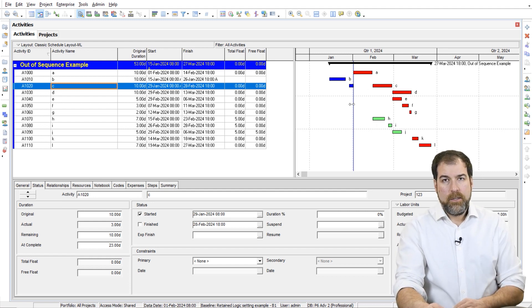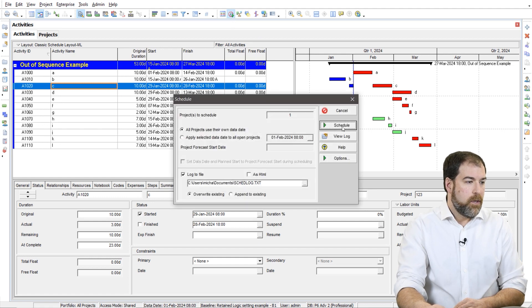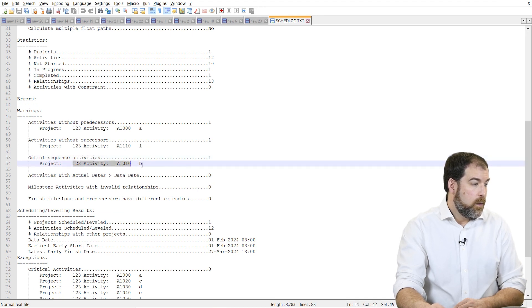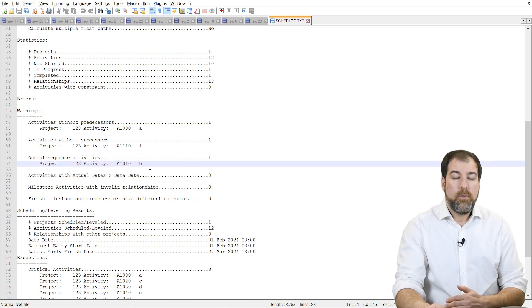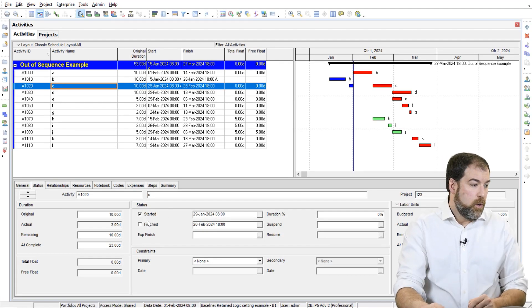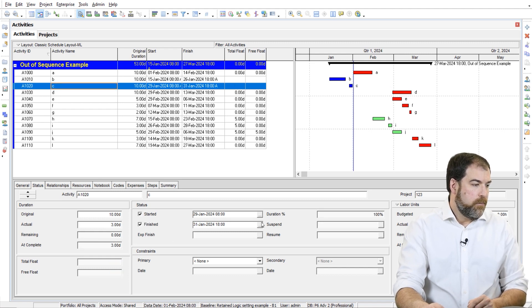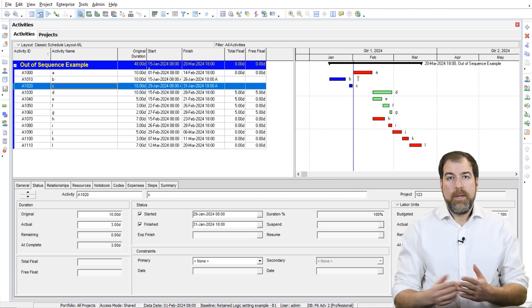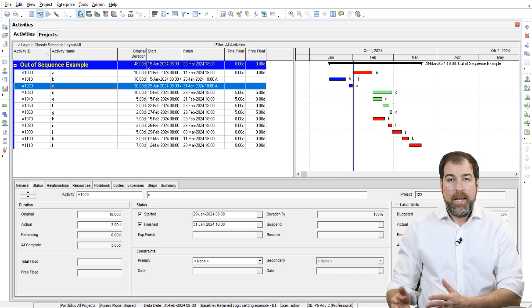So that's an out-of-sequence situation. How do we find these? If you don't spot them on the Gantt chart, there are other ways. If I go into my schedule log and scroll down to the Errors and Warnings section, it'll tell me out-of-sequence activities — activity B was done out of sequence. Another situation might be that we actually finished C. What if we had finished C back in January as well? Let's say C finished on January 31st, and if we reschedule the work — A is still coming up as do A next.